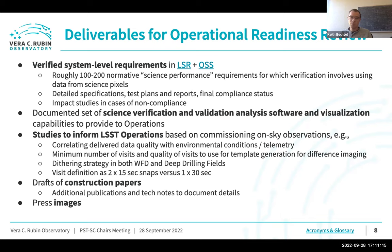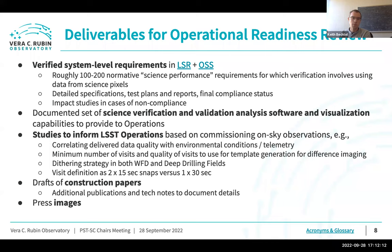For each requirement we need the detailed specifications, our test plans and reports, and our final compliance status, including understanding the impacts of any non-compliance. The next major set of deliverables is the documented set of all science verification and validation analysis software ready to be handed over to operations, so we know we're taking good quality data during the 10-year survey. There's also a set of studies to inform LSST operations that benefit from on-sky data, including template generation for difference imaging, dithering strategy, and visit definition — such as whether to take two 15-second snap exposures or a single 30-second exposure.